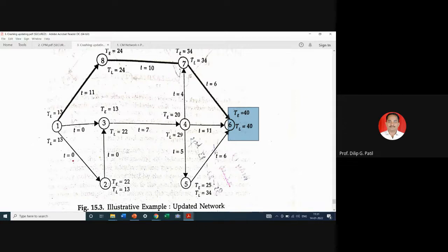The change that happens, we will reflect in our project network, and we will take the day of updating as T of the starting event, and we will keep finding the change in project duration or change in critical path. Accordingly, till completion of our project, we can have review meetings. Accordingly, we will give inputs to the execution team and project manager. We will sort out different issues and keep updating regarding the progress of the project, and then only the project will get completed.